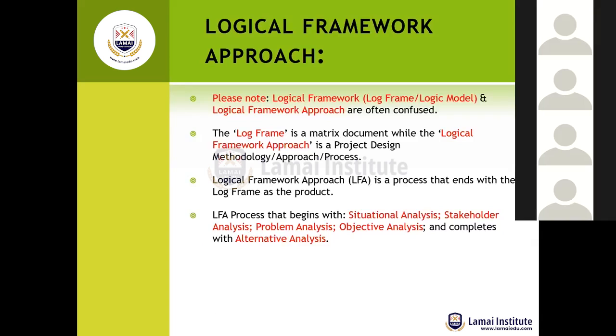The LFA process begins with a number of steps. The first step that we normally undertake is the situational analysis. Then secondly, we go into stakeholder analysis.